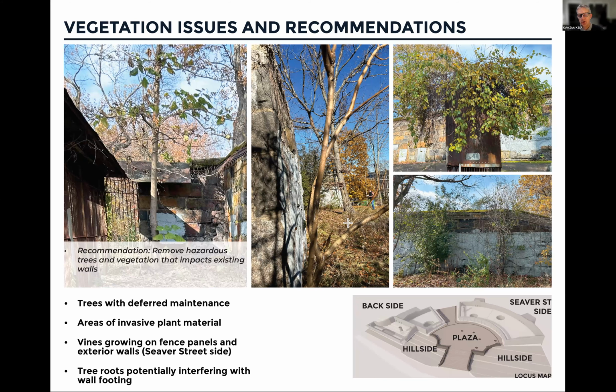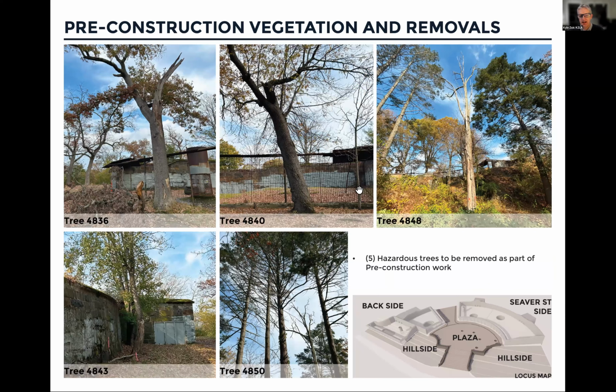And then I mentioned those older hazardous trees. Here are photos of 5 of them that will be removed as part of the pre-construction activities. These numbers are an identification number for each tree that was assigned as part of the tree inventory. And there's a brass tag on every one of these that has that same number on it.